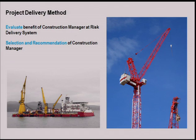So Skanska, as Michael mentioned, almost immediately and at their own cost, have been pretty active in working with the team to look at the process for developing a cost plan, which is a vital component of the basis of design, and a plan that the whole team can confidently stand behind. A main objective of the basis of design, as was mentioned, was to present a concept to City Council that's done within the available construction cost budget. So by carefully evaluating the constructability, the building structural systems, the materials, and the projected costs with the construction manager at the beginning of the design, we feel that goal can be accomplished. So with that, I'll turn it over to Tim Williams with Michael Maltzan. He'll step through the activities on the cost plan to date.